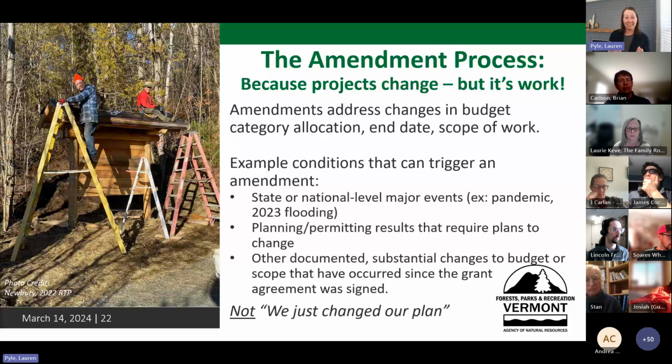The flooding events of last year happened. We have grantees who had plans to go, and then all of a sudden they can't find the contractors to do the work because all of those contractors are booked doing flood recovery. And so it changed, right? It was this huge significant piece.